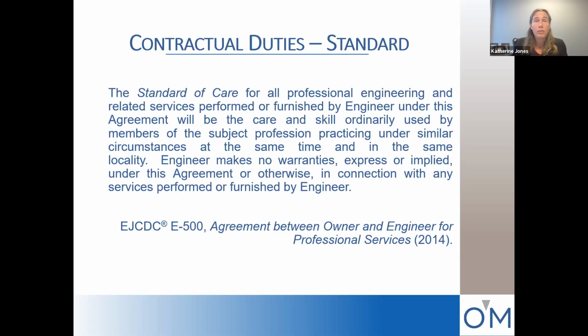This standard of care, however, is very, very consistent with what the negligence standard of care would be in Illinois. I also want to note that this standard of care does not require a design professional to be perfect. It simply requires the design professional to act as a similar member of the engineering profession would act in the same locality.